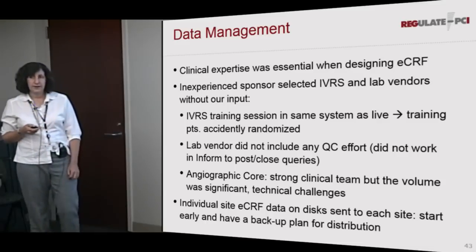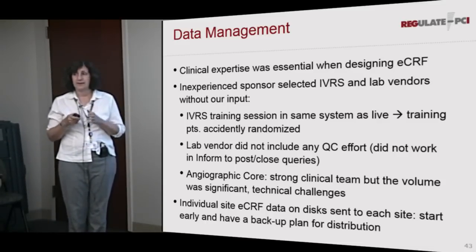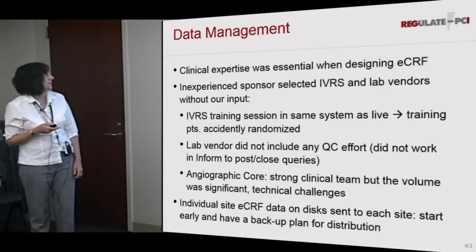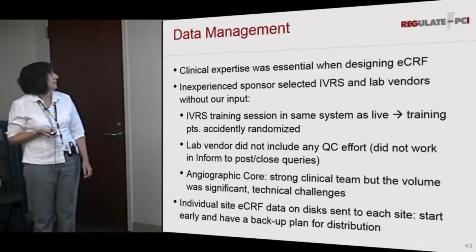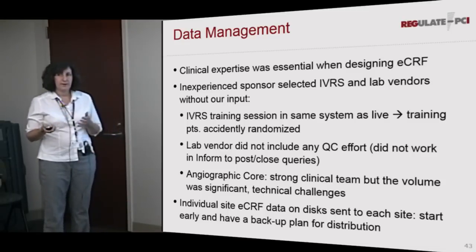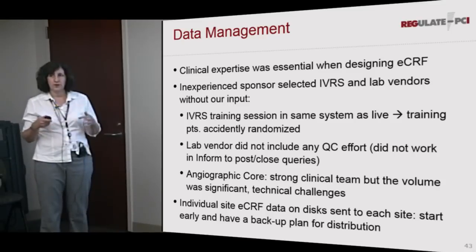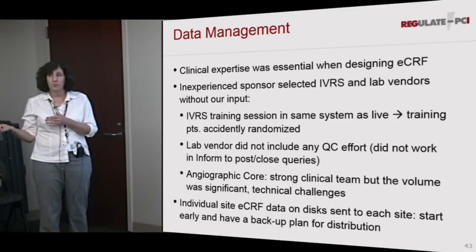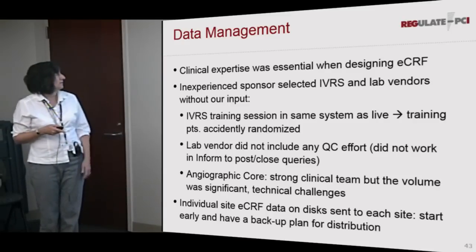We did have a very inexperienced sponsor. They had people from all over the place, but they were really tiny, and they hadn't ever done a big trial like this. So one of the things that they did was they picked out their IVRS and their lab vendors, but they never asked us anything. So we ended up with this IVRS group that created a training database in the same database as their live database. So people would go in to try to learn how to randomize a patient, and then they would randomize a pretend patient. So Lisa was constantly backing those people out of the system.